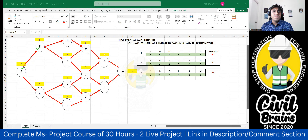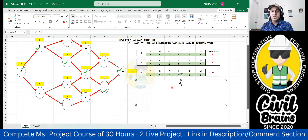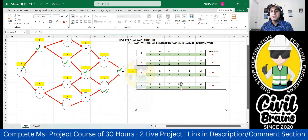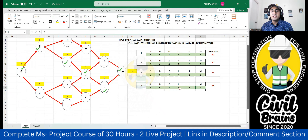A fourth path: A → B → E → I → L → M. From I, instead of K, I take L then M. Durations: A = 8, B = 6, E = 3, I = 7, L = 6, M = 3. Total: 8 + 6 + 3 + 7 + 6 + 3 = 33 days.